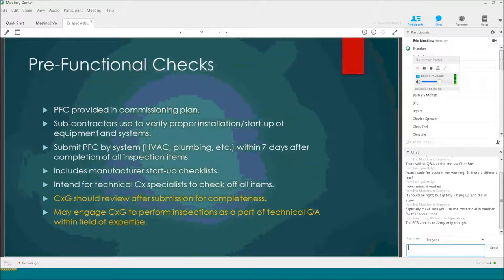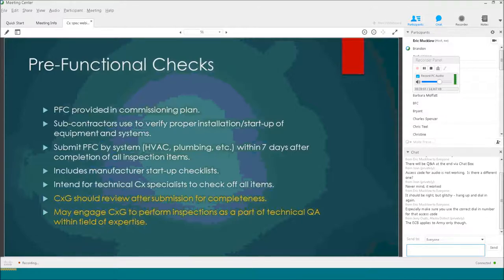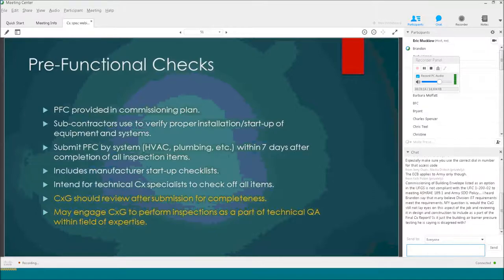Pre-functional checks are inspections of generally the HVAC systems, plumbing, lighting, renewable energy, and any other active systems. The subcontractors check off all those items on pre-functional checklists, which are submitted within seven days after finishing inspecting all items. They also have to be checked off by the contractor's commissioning specialist and should include the manufacturer's startup checklist. The government specialist should review those checklists for completeness: did they really complete all the checklists? Did anybody fail to sign off? You might also want to have the government specialist come out and perform an inspection as part of the technical QA.